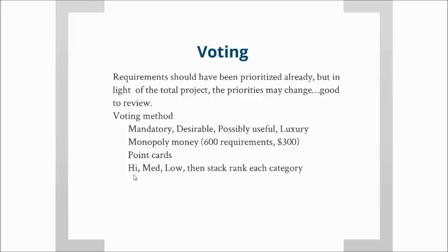And then you get the entire list from top to bottom organized and stack ranked from 1 down to however many requirements you have. Then you let the stakeholders soak it in. And if they say, I really believe that this requirement at number 89 is much more important than number 46, so we need to move it up, that's okay. You want to have those conversations.